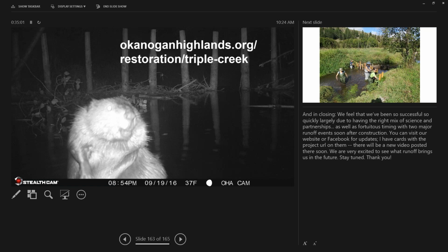If you include the riparian planting component, that's a very expensive component. I've looked at that as, like $80 a plant is what we've spent so far, I believe. But we have like 87% survival, and our plants are doing really extraordinarily well because we're giving them irrigation, sheet mulch, drought protection, everything you can do for a plant. So we're spending a little more per plant, but we're getting really great results. So it's really hard to quantify the cost because, like you said, do you do it per acre? Do you do it per structure? Do you do it per year? And I guess I need to sit down and try some different ways of breaking it down that I would be able to share other than what I've shared just now.